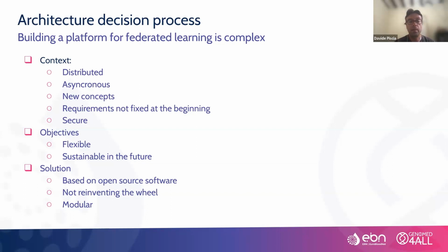Another complexity, as you might imagine, is that the requirements we needed to build the platform were not completely fixed at the beginning, because some requirements are the output of work packages. So we needed to synchronize with other work packages and communicate with them what they need and what we need to know. So that was also a bit complex. And then, of course, because we handle sensitive genomics, medical and clinical data, the platform has to be very secure. So this is also an aspect that we need to take into account when we plan and when we implement the platform.